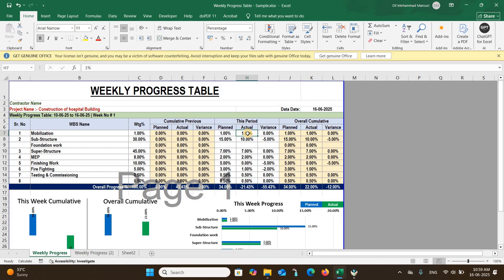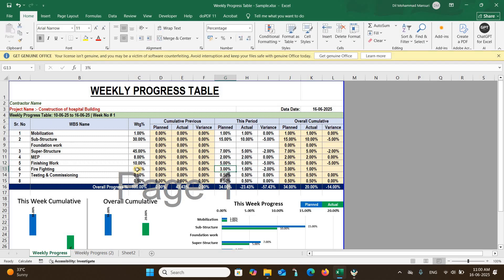You update this at the end of the week, similar to how we update our monthly schedule. When updating, you can see what was planned versus what actually happened. For example, we planned 1% for mobilization and completed 1%. We planned 15% for service structure but completed only 10%. We planned 7% for another activity but could only achieve 5%. For finishing works, we planned 5% but couldn't start at all.